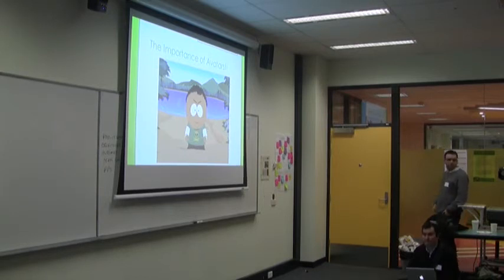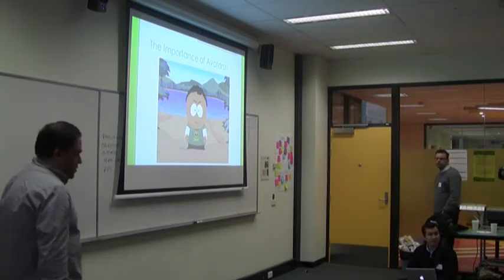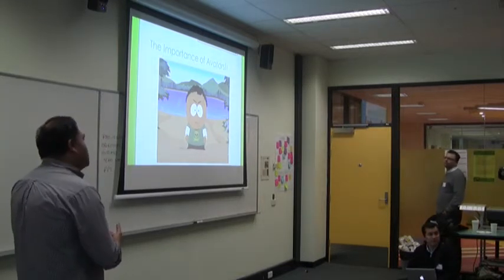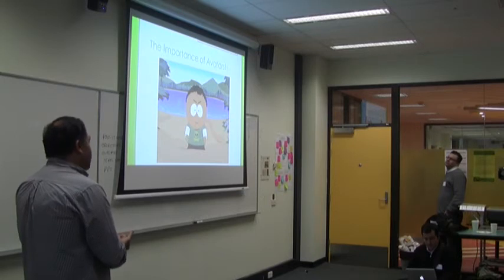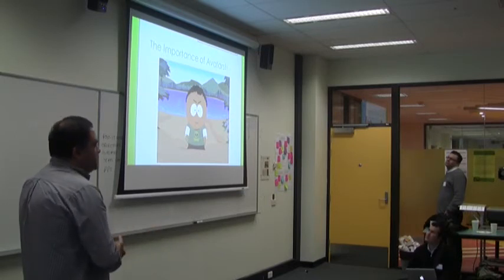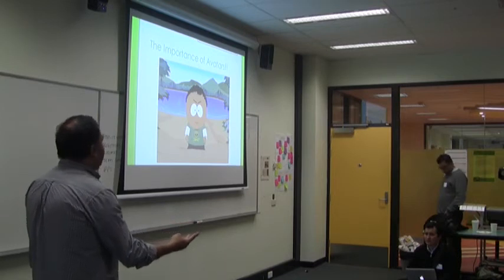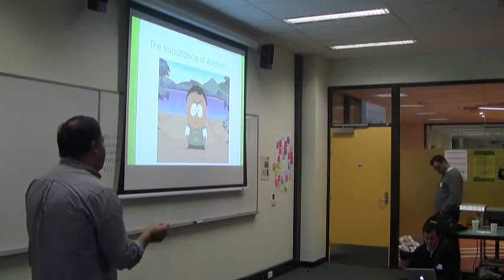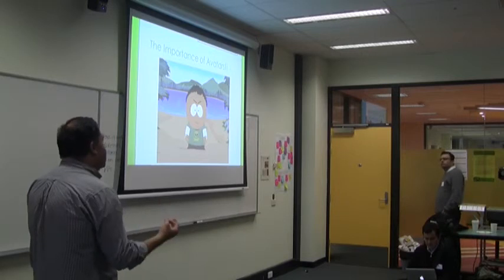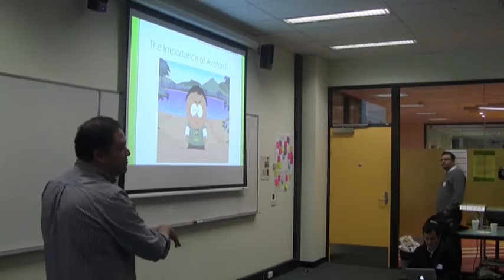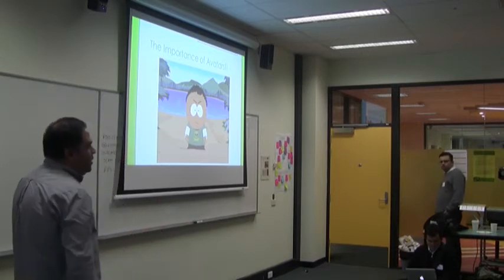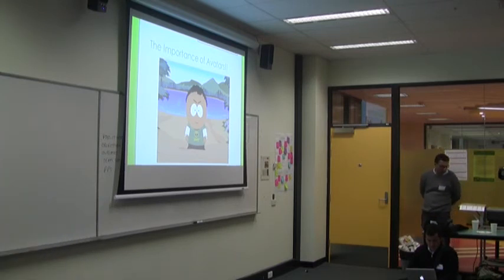What do you mean by that? Only having one avatar, you mean they can only work on one task at once? The whole thing is to stop the multitasking. Because the theory of constraints is that you're only as fast as the slowest thing you process. So you deliver two things equally slowly if you work on two things. Work on one thing, that thing gets delivered faster than the second thing that is equally as slow as it would have been. Does that work for everyone? At least you have the conversation if they want to do multiple things, right?